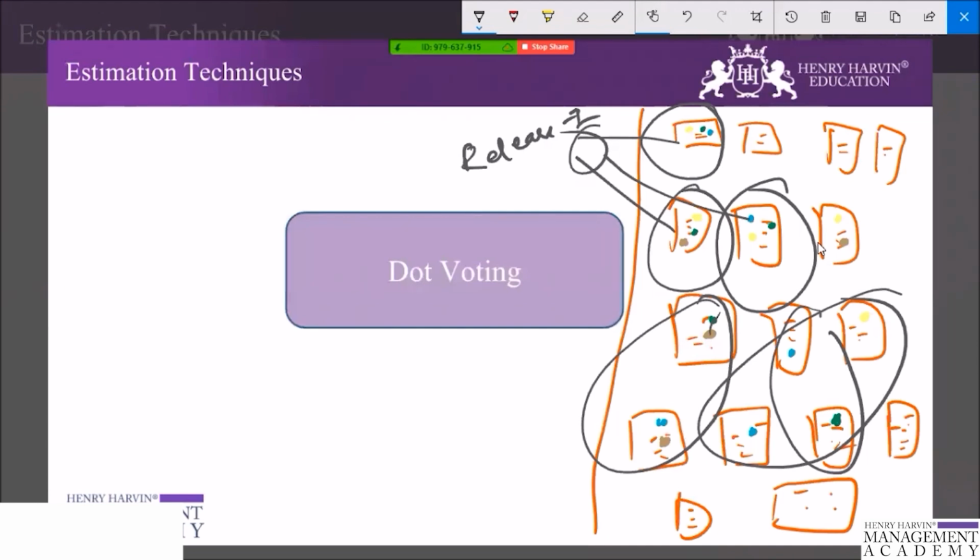If after the first pass it is almost certain that the stakeholder will not be completely happy with the outcome of the vote, in that case we can review the voting and optimize it. We can arrange the votes into the three categories that we said: high, medium, and low priority, and discuss stories in each group, move items to create the high priority list, and then move items to create the low priority list. So this voting can happen 2 or 3 times, or 1 or 2 passes.